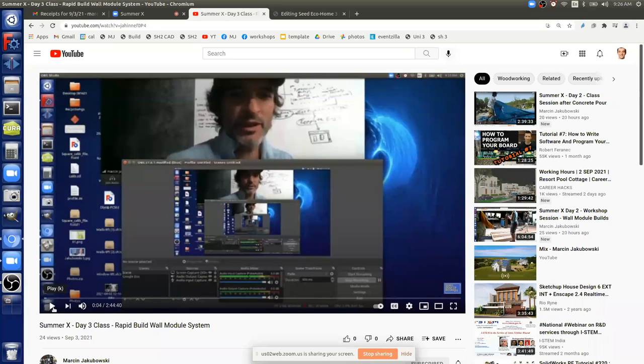The taskmaster, and all builds of everything we're doing on the board. Before we even touch a board down there, that board needs to be clean with a magic eraser, and then prepped to have everything listed. It was kind of easy to do, but we were all confused the whole time. That board can be a key component where we just write. We have somebody as a taskmaster who writes everything on the board, makes sure everybody's doing what they need to, and gives people tasks as we finish the modules, showing them what needs to be done. Because the wood cuts are the key component.